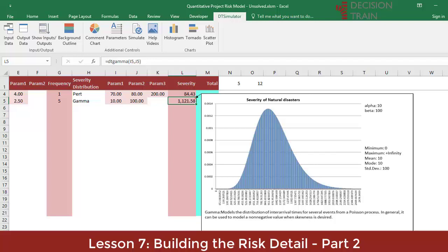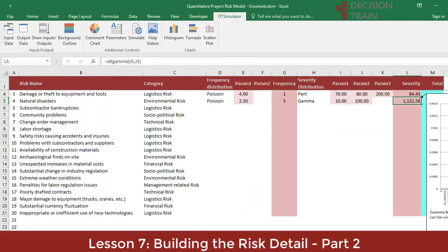The gamma distribution is widely used in meteorology to quantify events such as precipitation, tides, flows, etc. It can be used to model a non-negative value when bias is desired. Its two required parameters alpha times beta equals the mean. In this way, the severity of this event will have an average of 1000 — 10 times 100.